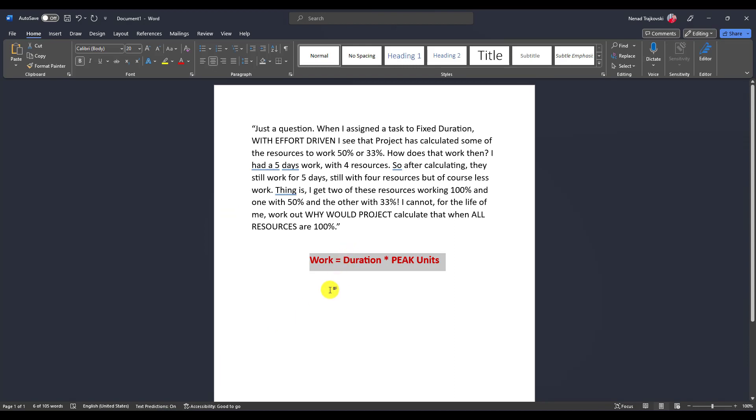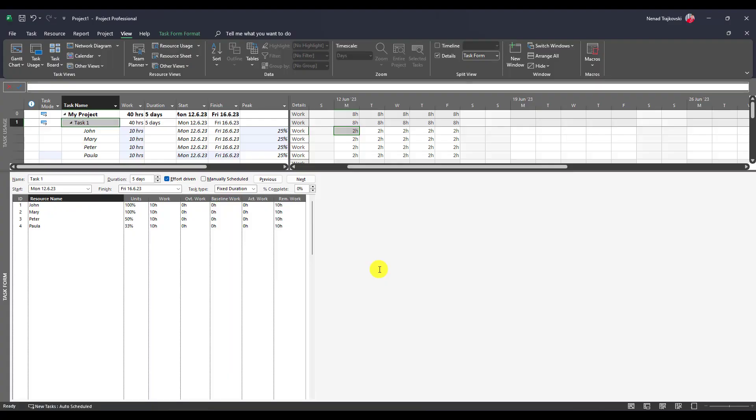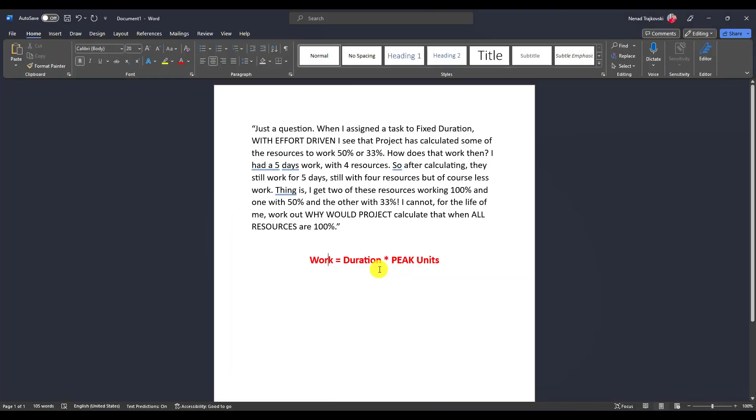Work is duration multiplied by peak units. If I go here, peak units is 25%, so work...